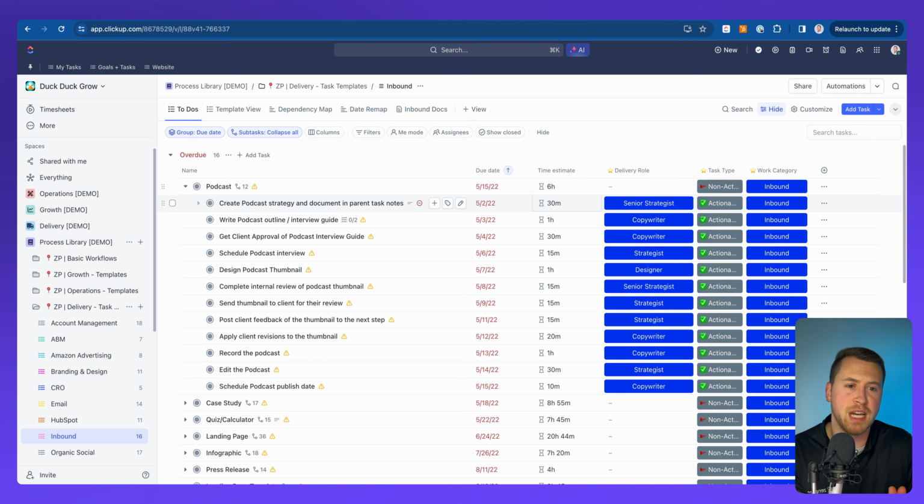And that 4-hour time estimate is essentially just to help with things like workload and just make sure, again, I can confidently close this task, because I don't want to go finish my workday and be halfway through a task. I want to do the best that I possibly can to have a due date driven methodology, have all my tasks in there that people can complete on one day. If they have to remap it, they can remap it.